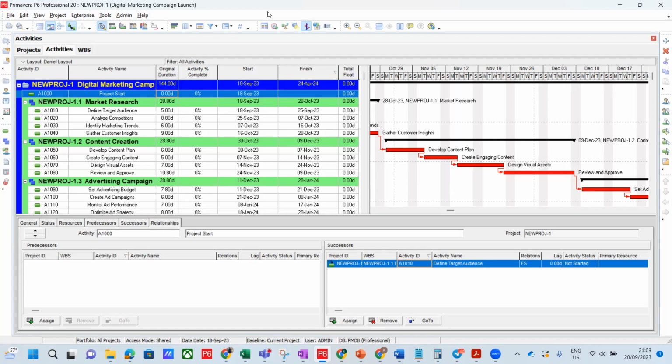Right. Daniel, we can say, okay, project A, let's put design engineer as a role, but we're not sure if Daniel or Ade is the one that we assign to this. For now, let's just put a blank name, a placeholder. We're going to need a design engineer to do this job, but we don't know yet the named resource that we're going to assign. So you can do that at the beginning of a project when you are planning it out.